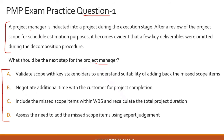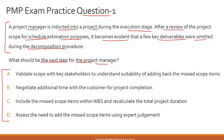Now let's start with question number one. Please read the question and try to answer it before we solve this together. A project manager is inducted into a project during the execution stage. The project has moved from initiation to planning and is now in execution. After a review of the project scope for schedule estimation purposes, it becomes evident that a few key deliverables were omitted during the decomposition procedure. To help you solve this question, you need to know what decomposition is: it is the process of breaking down the scope of a project into manageable work packages, and the output is typically a Work Breakdown Structure or WBS.